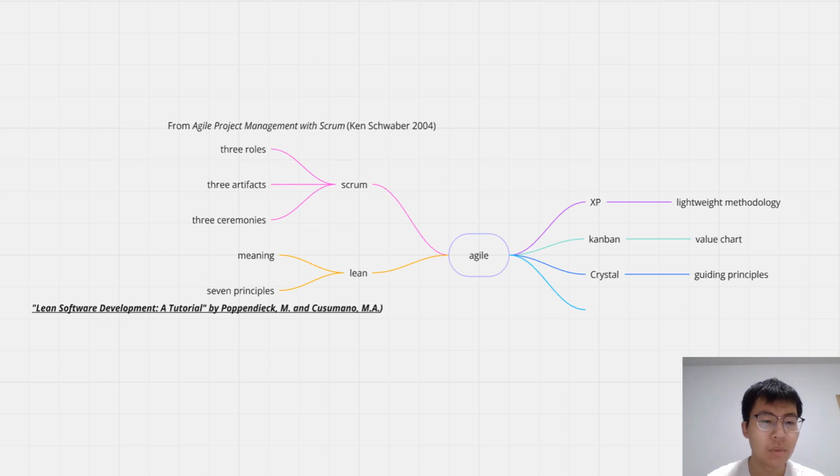Product backlog. The product backlog is where product owners create a prioritized list that evolves and changes priority with every sprint. The second is sprint backlog. User stories are a way of describing a feature that follows: as a user, I need something so that. And the third is the burn down chart. This chart should approach 0 points as the work is being completed.